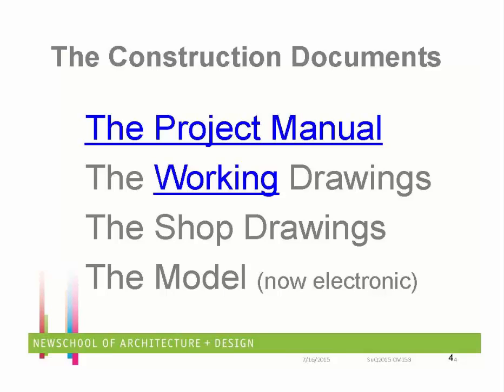So the specification is a tool that is more often used by the bidders and the attorneys than it is by the architects or the constructors. Okay? It's a really important lesson that I learned that day, and I made sure that in the future, if I was writing a specification, it was about the stuff we were doing, not about everything about specifications. It very specifically dealt with it, and if it could refer to a national standard, it referred to it as opposed to including it. And that's what we learned.